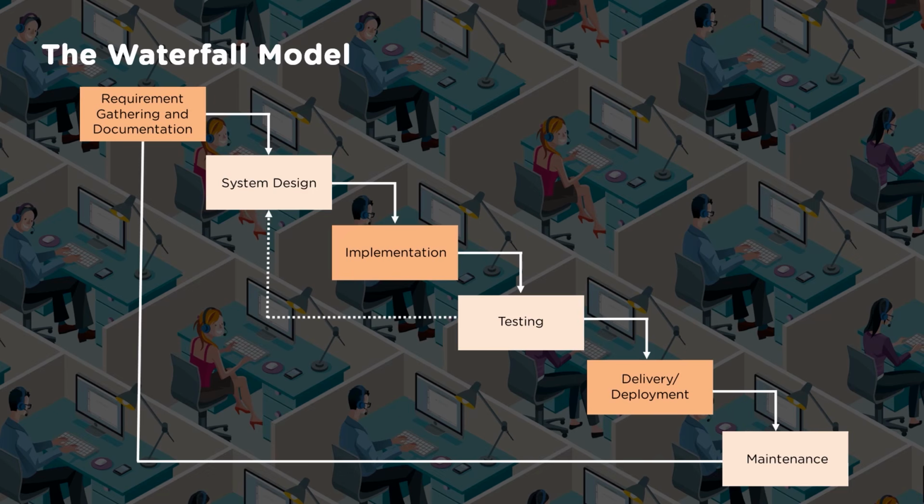Now, when you want to do that change, you may require to do that change only after understanding what would be the impact of this change in the entire output which you're going to create, which is very comprehensive one. Because of this, it consumes time, it consumes extra effort. So it may be a scenario where the scope of work is reduced as well. Even after that, this exercise has to be done, which will delay the project.